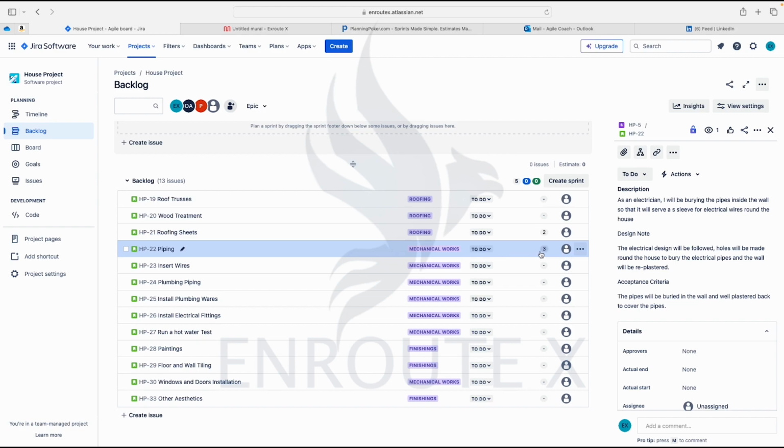So we're going through the INVEST criteria. We've ensured that this story is independent, it's standing on its own. Standing on its own means it's something we can start and finish within that sprint. We don't need to extend it further. We also don't have any other thing that is affecting it. It is not that when we get to the field to start work, we now realize that pipes are not supplied. That means that this story is not meant for the sprint in the first place. Meaning also that this story does not meet the definition of ready.